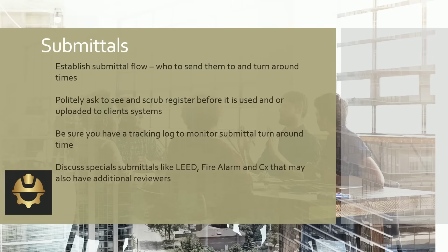Well, yeah, and more to that point, if you've got a designer that you've determined has a review time of 14 days, and the clock starts as soon as you hit send on the email or notification in Procore or Prolog or whatever you're using, and they're historically taking too long with their reviews, and you're getting heat from the owner or the client, and you're getting heat from your PM, you can go back and say, okay, look, the electrical designer is taking double the amount of time that he should.